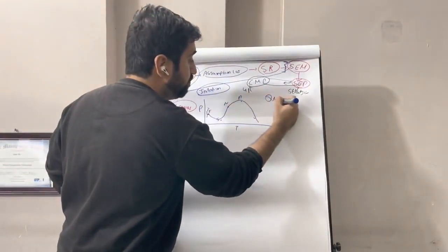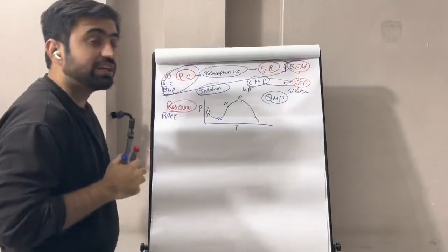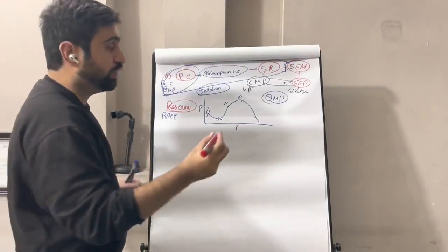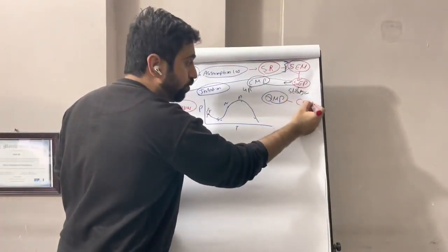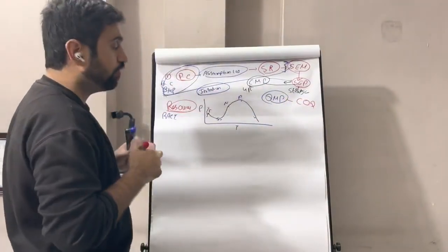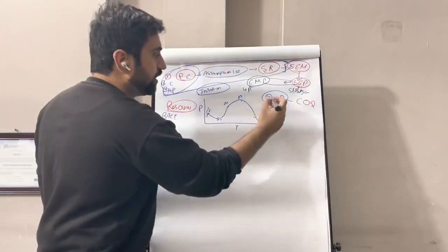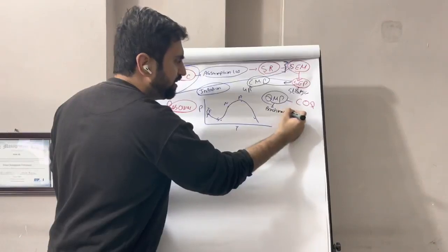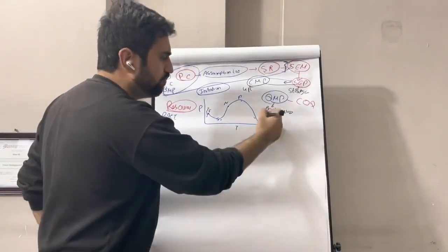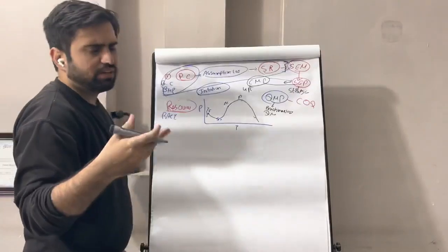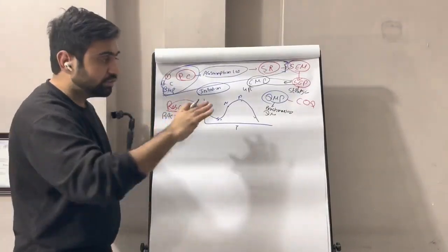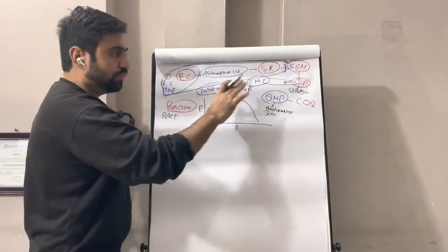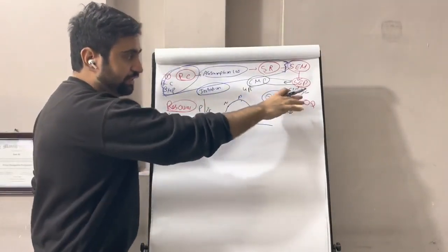The quality management plan is made here, considering what standards we are going to follow, what tools and techniques we are going to use, what will be the cost of quality, cost of conformance and non-conformance, what standards like benchmarking we use, and what techniques we are going to use. In addition to the quality management plan, we also make quality metrics. What are the KPIs we are going to measure in this process? So the KPI metrics are also defined in this process. So now the quality plan is made.